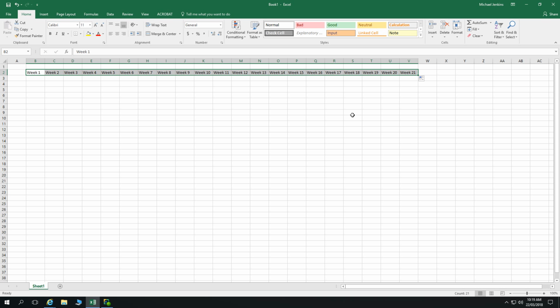Now, with a very standard 3-bedroom brick veneer house that's adopting very standard sorts of technology and is being built to standard dimensions, where we're fairly rectilinear, where we're not having compound curves and slopes going everywhere, it's going to be a fairly quick build. We can do that in about 16 weeks. We can even chop that down to 12 weeks if everything aligns perfectly. We may not want to schedule for 12 weeks because that requires everything to align perfectly, but certainly within that 16-week period we can build a house. And that's what we want to set up. So fill it out to 21 weeks, if you wish. That gives us a little bit of a buffer.